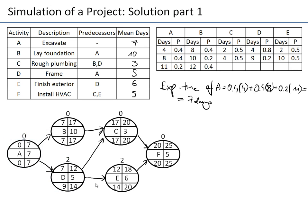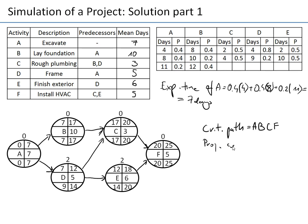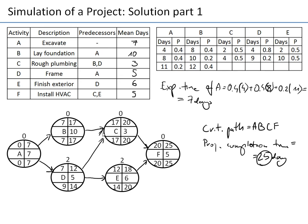Looking at those activities, A, B, C, and F all have zero slack, forming one path. The critical path is A → B → C → F, and the length of this critical path is 25 days. So the project completion time, based on expected activity durations, is 25 days.